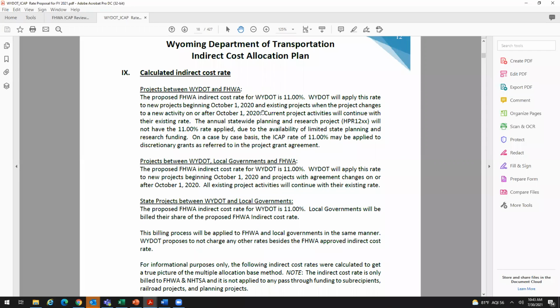So this goes to what Eric was talking about yesterday. Your system has to be able to turn off and turn on the next rate, because a rate shouldn't be applied to a project for the life of a project. A rate is good for the life of the effective period of that rate. So if you have a project that's going to span 3 years and you have a fixed with carry forward rate that you have a new rate every year, then that project could have 3 different indirect cost rates, from June 1st or July 1st to June 30th of the first year, you have a rate of 10%.